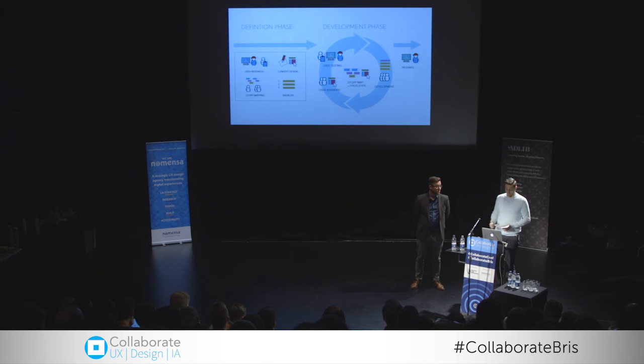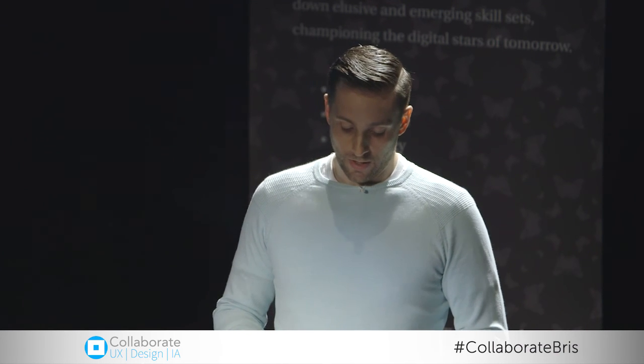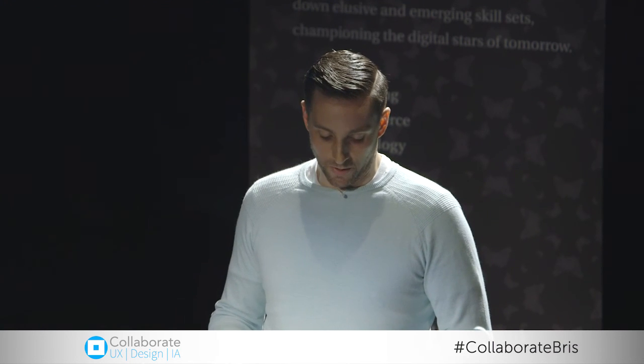Normally, this is one sprint ahead of the development, and this is the dual track scrum style. So this is when we look at the finer details of the design or the story map, and we use our user advisors and our product owners to do this. This provides the details when they're most relevant, it makes them more digestible, and it stops a team getting too much information up front at the start of the project and getting swamped by that.